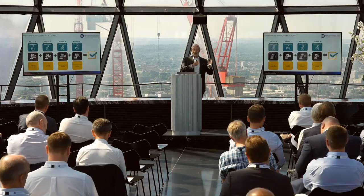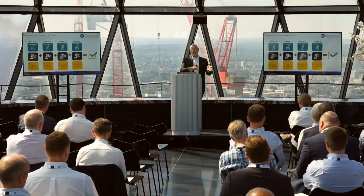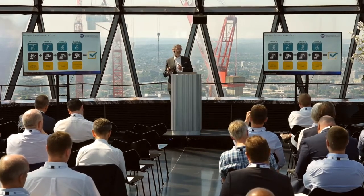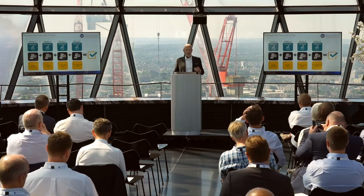But every problem, I believe, every problem you're going to have on a project is baked into the design. 50% to 80% of every problem you're going to experience is in the design documents. So if you can intervene during design, or even ask for it properly. If you don't specify what you want to the design team and give them a good design brief, the design team is going to give you what they think you want, right? So you've got to really lay it out.